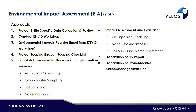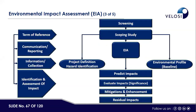For this case study, we conducted site-specific data collection and review, then conducted the ENVID workshop, developed a scoping report, and established baseline conditions through baseline surveys. Surveys carried out included air quality monitoring, groundwater, soil, and noise — some conducted by us, some provided by the client. Modeling studies included air quality dispersion modeling, noise assessment, and soil/groundwater assessment. Afterwards, we developed the environmental impact statement and environmental management plan. The EIA flow chart: first carry out scoping, then detailed environmental impact assessment, then predict impacts, evaluate them, propose mitigation measures, and assess residual impact as low, medium, or high.